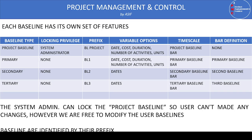Primary, secondary, and tertiary baselines are labeled BL1, BL2, and BL3 respectively at the end of the project name. An important difference is that the project baseline and primary baseline offer more variable comparison options — including variance of dates, cost, planned and actual duration, number of activities, number of resource units, and performance percentage. In contrast, for secondary and tertiary baselines, you can only compare variance of dates.